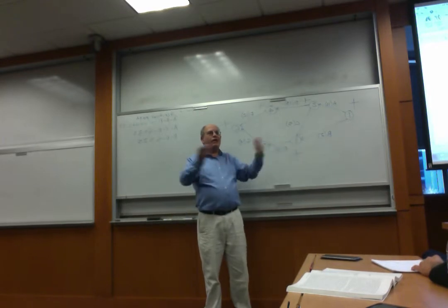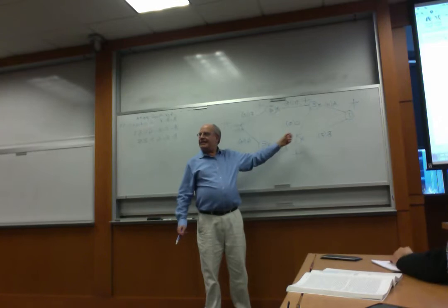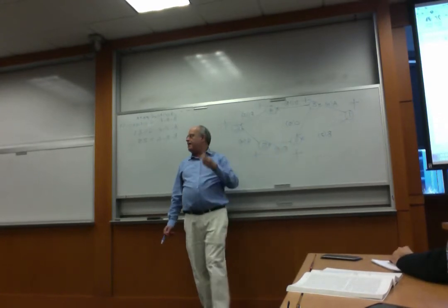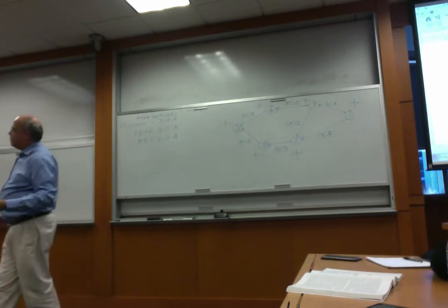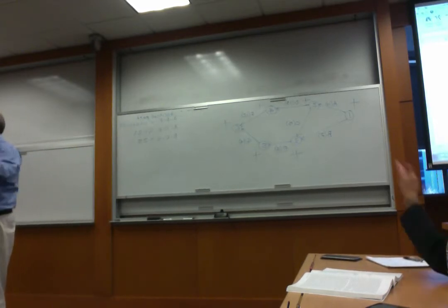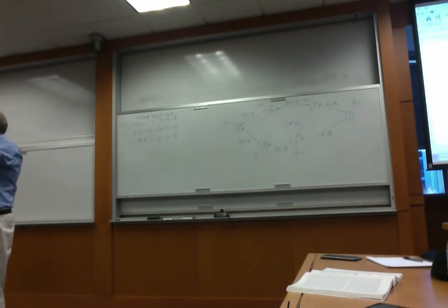If you don't understand this, it's going to look like a mathematical exercise. It's like a production where in order to complete certain activities, and I used a very good example from construction management. We say, when can you start building the walls? When you finish the foundation. When can you start building the roof? When you finish the walls. When can you start the plumbing? When, again, you finish the walls.